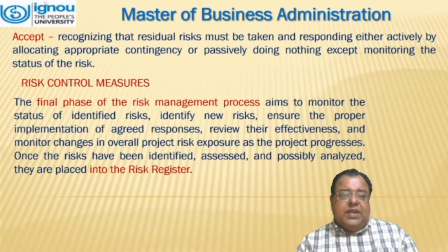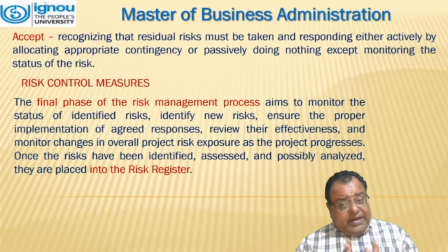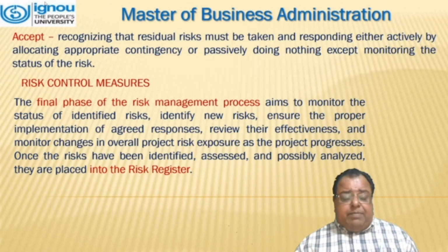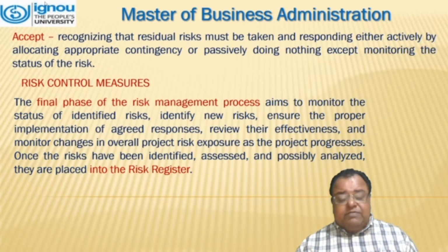Accept: recognizing that residual risk must be taken and responding either actively by allocating appropriate contingency or passively by doing nothing except monitoring the status of the risk.